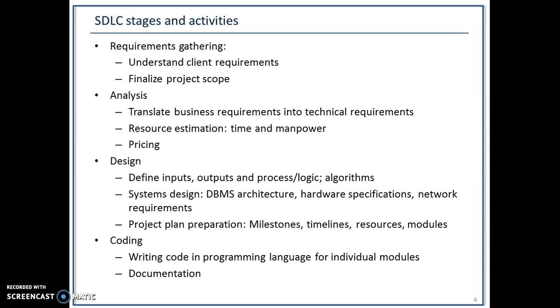And pricing. Depending on the time it is going to take to execute the project and the number of people required, they will arrive at a price, and then they will communicate this price to the client, saying that if you want to build this system, this is the cost. If the client agrees, there is a lot of negotiation which happens between the client and the business analyst, but it is all done on the basis of the requirements gathering and analysis phase.